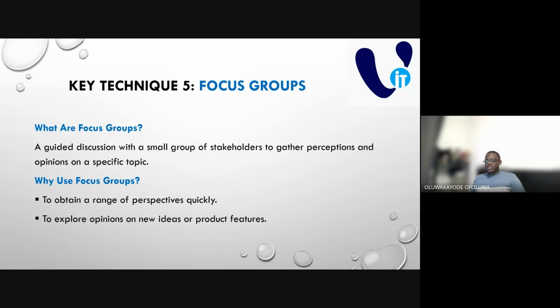But customer service, because this thing is going to help their own job, they're all thinking in one direction. So what makes a focus group different from our workshop is that a focus group is for people with similar perspective or similar focus.